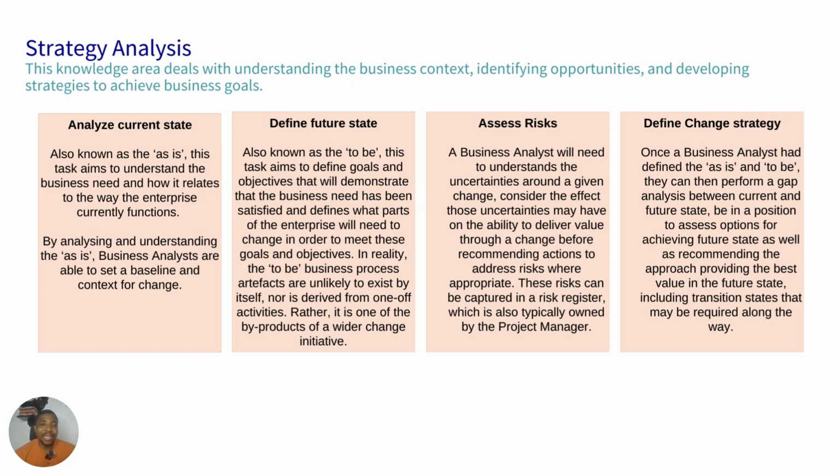Once you've defined your as-is, which is your current state, you've analyzed it, you've defined your future or your to-be state, then you perform a gap analysis. Of course, there's a gap between where you are right now and where you want to be. You define the gap, you analyze the gap, and come up with a change strategy. That is, come up with plans, right, that will take you from where you are to where you want to be. And this, my people, is why I love business analysis so much.